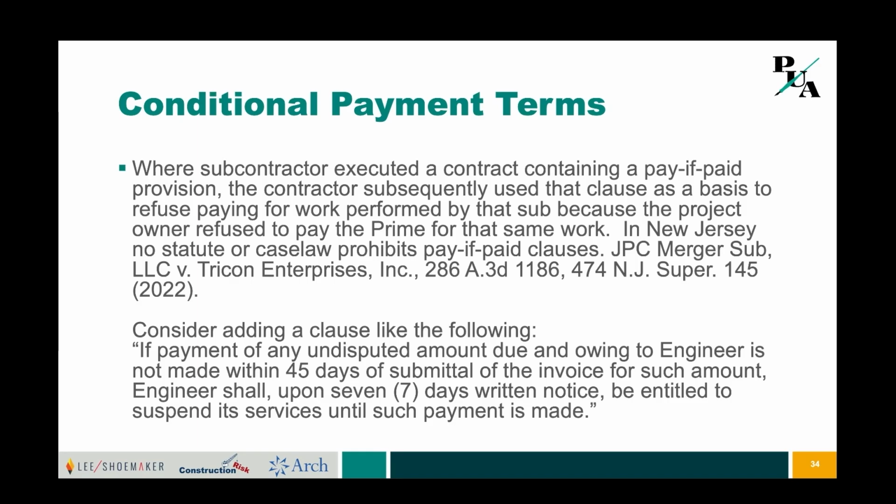Yeah, so conditional payment would be what we call a pay-if-paid clause or a pay-when-paid clause, meaning that if you're a subcontract designer working for perhaps a prime architect, or maybe you're working for a general contractor or design builder, the clause says you don't get paid until they get paid.